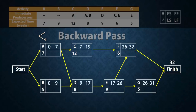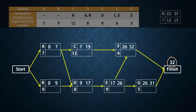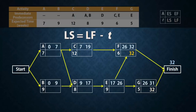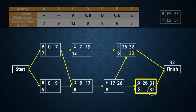Now let's do the backward pass. Since the project completion time is 32 weeks, the latest finish times for the activities at the finish node, F and G, has to be 32. That is, F and G cannot be completed in longer than 32 weeks. Next we obtain the latest start times by subtracting the activity times from the latest finish times. For G, the latest start time will be 32 minus 5, to give 27. For F, the latest start time will be 32 minus 6, and that gives 26.